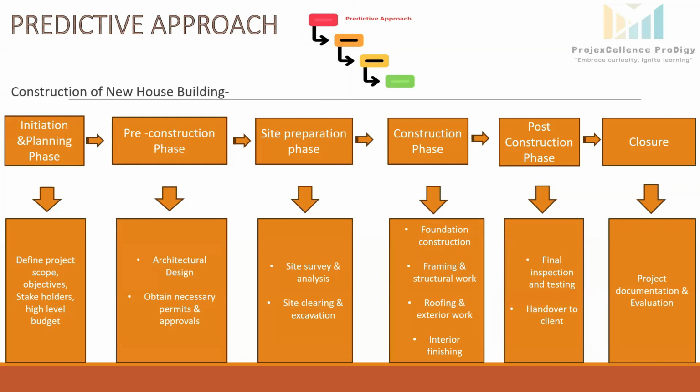They will create one punch list which will contain the items which differ from the plan or which have discrepancies. The contractor will advise his team or the concerned person to rectify all the problems. Once it has been solved, the house will be handed over to me, the client.